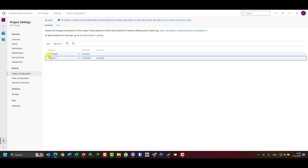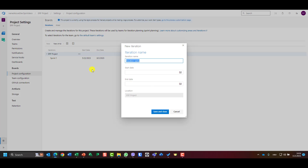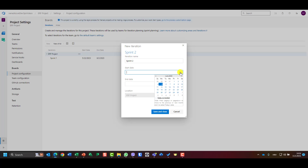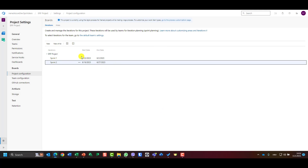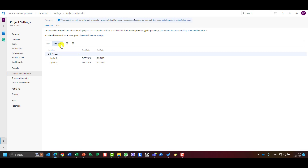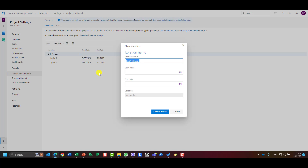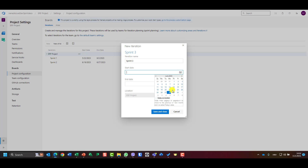Now I'll add a new child for Sprint Two. When I choose the start date, Azure DevOps automatically sets it to June 5th — the first working day after Sprint One ends — and the end date becomes June 16th. I'll create Sprint Three the same way.